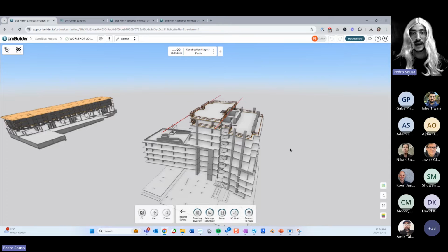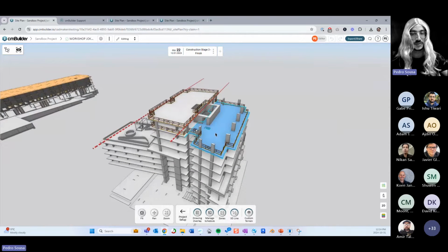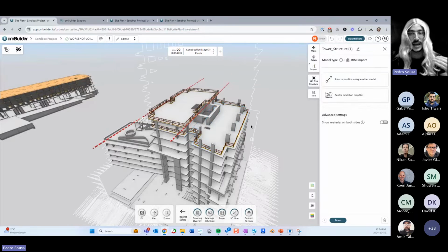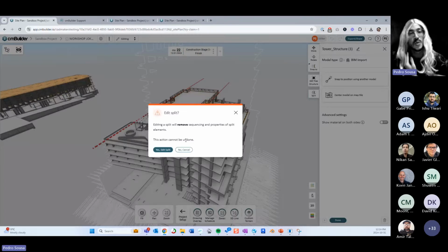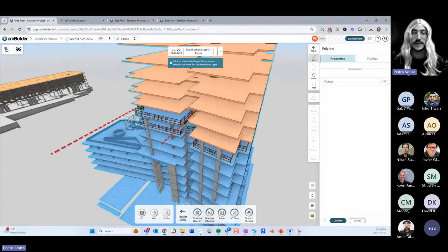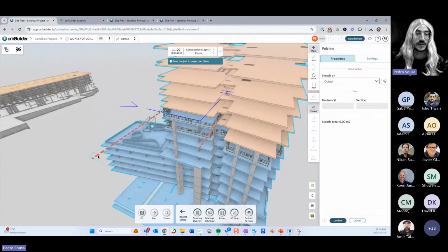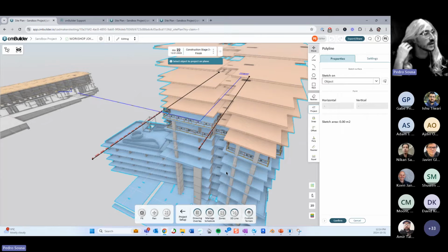And then if I update this model, the next time that I create a split for this model, instead of drawing the lines all over again, whenever you're creating a line, you can simply do the same thing by projecting the shape of the template. So you have those lines created for you automatically. Okay, so you're going to need to use the tool again, but instead of drawing everything from scratch, you can simply use these templates to slice them again.